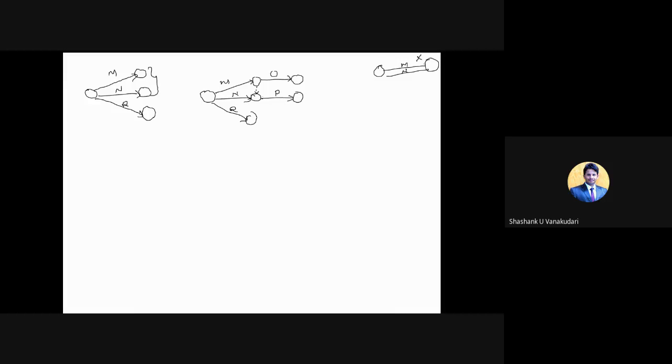Okay. So as per the rules and regulations of the network diagram, two activities won't start at the same node and won't end at the same node. So for these conditions, we have provided the dummy activity by using the dotted line.